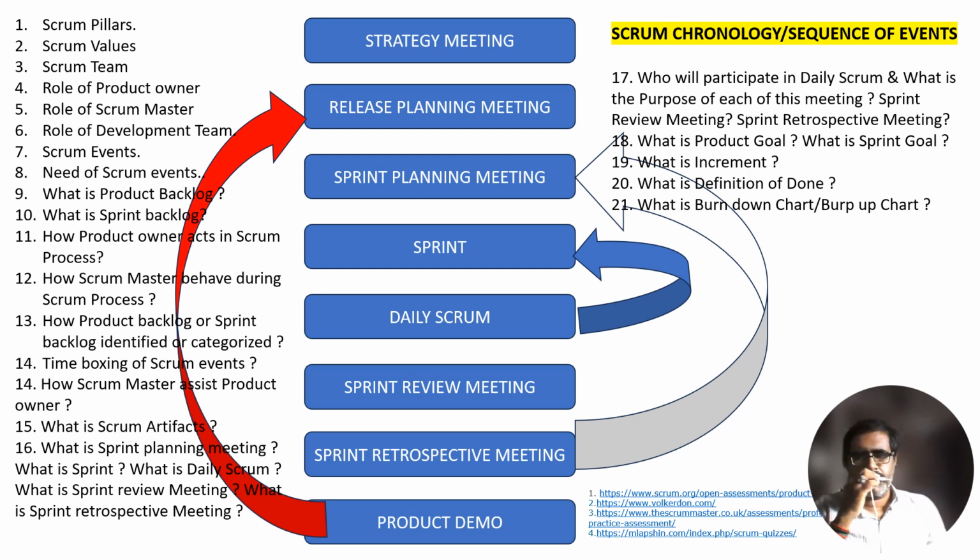Final one, definition of done, simply called a DOD, defined in the Scrum. Definition of done consists of completion of actions required for deliverables in a sprint. For example, peer review, unit testing, and meeting acceptance criteria can be a part of this. Deliverables cannot be said to be completed until these actions have been successfully completed.